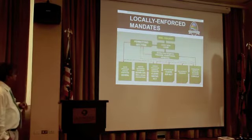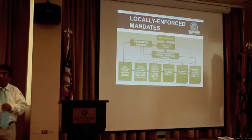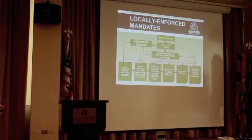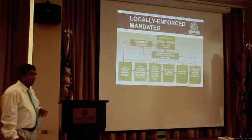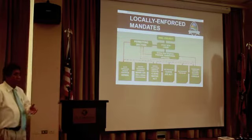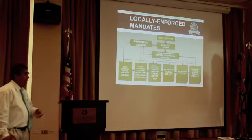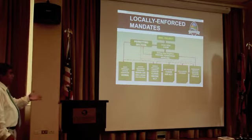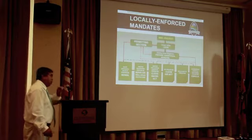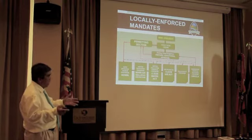Okay, I think there was one that's missing. What are we asking when we have this permit? I think it was deleted, but it's similar to the design review, but it's more specific. Okay, like on the safe drinking water, what we'll be asking is, are your plumbing fittings lead-free, or do they meet the NSF requirement? Or do you have water treatment in the system? Or do you have a water storage tank? Okay, does your plan meet, again, the requirement for the drinking water? There's a guidelines for drinking water review, so that's what we're looking at. For the UIC, it's the same thing, that's being used, and the construction.